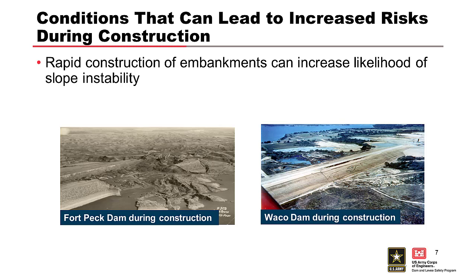There are numerous case histories where embankments were constructed at a rate that was too fast for the pore pressures to dissipate in the embankment or foundation material, which led to slope failure. These photos are from USACE projects — the one on the left is Fort Peck Dam and the one on the right is Waco Dam, both of which had major slope failures during construction.